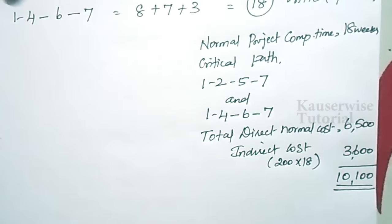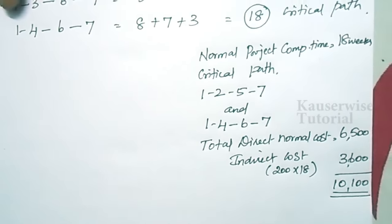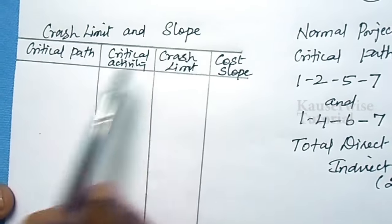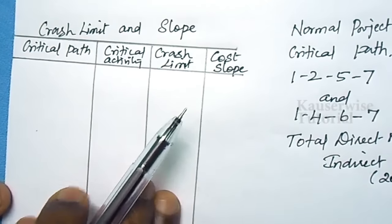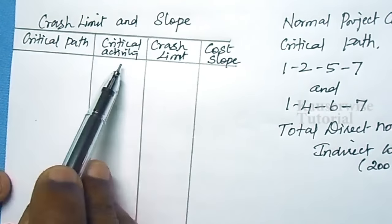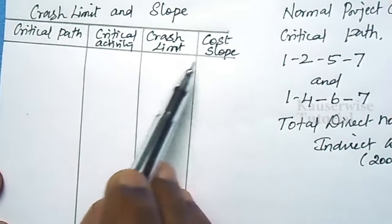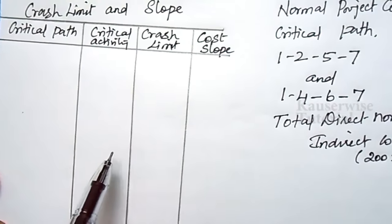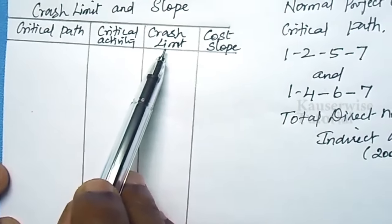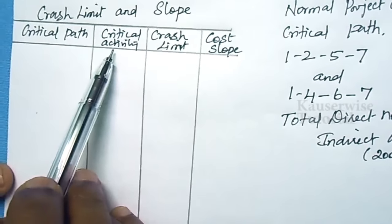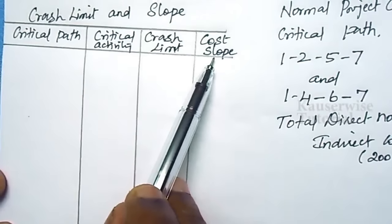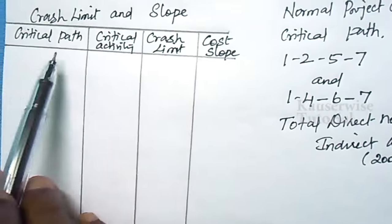Now we are going to crash the network to reduce the project completion time. To perform crashing, the next step is to find the crash limit and slope for each activity on the critical path. Crash limit is the difference between normal time and crash time for a given critical activity.